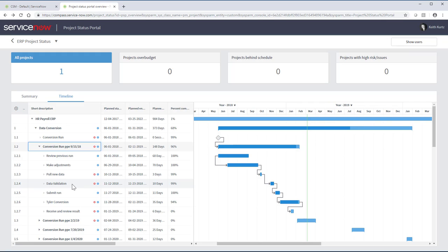if there is no status recorded in a task. The planned start, end, and duration can change while the percentage is not complete. When a percent complete is entered, the task is deemed to have started and an actual start date is entered. When a task is marked at 100% complete, an actual end date is entered. We can see the actual dates by dragging this line to the right with our mouse.